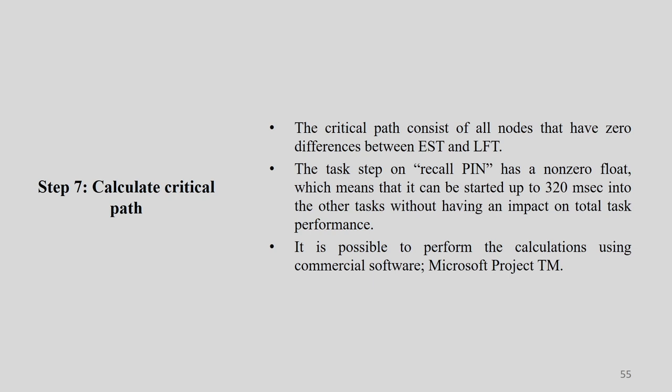Now once this table is ready, you have to identify the critical path. The critical path consists of all nodes that have zero difference between EST and LFT. So the earliest and latest, that portion you have to find out.